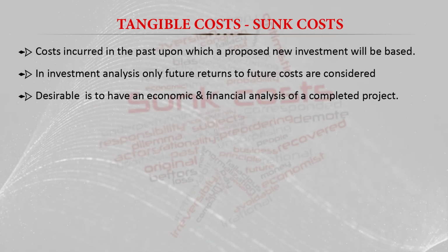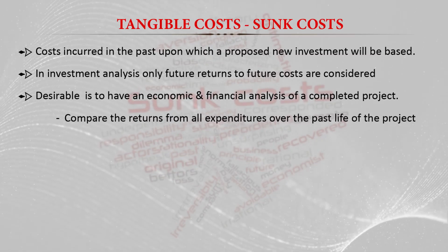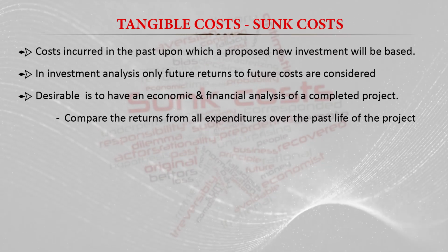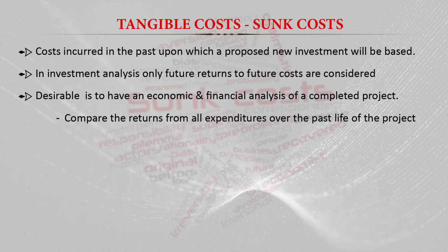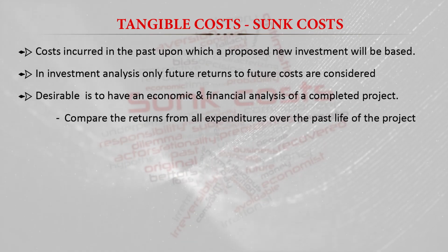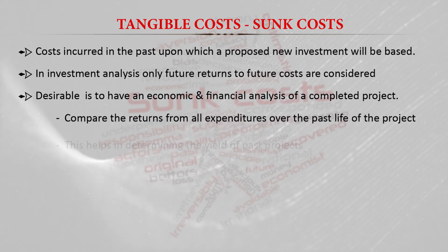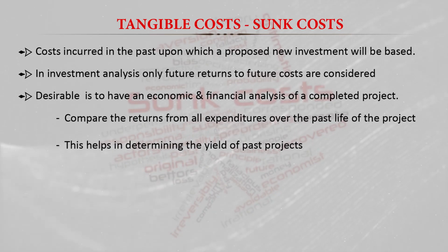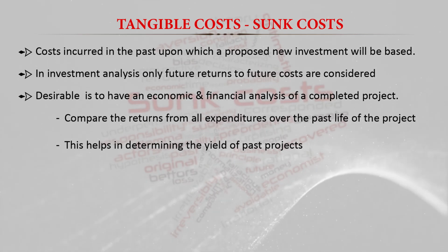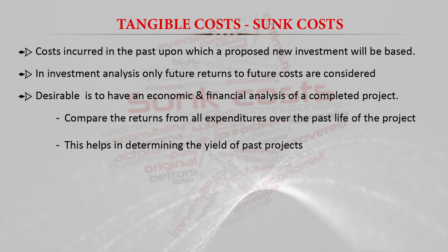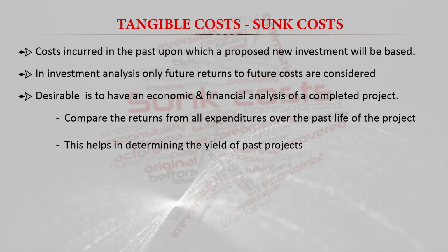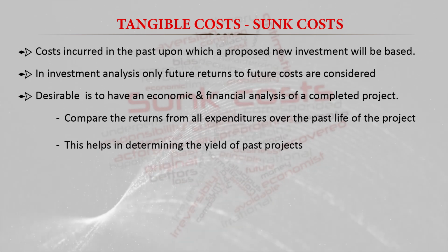We want to compare the return from all expenditure over the past life of the project, so we should include the cost of the land also. This helps in determining the yield of past projects. If we include the sunk cost as part of the cost and benefit analysis, it will help in determining the yield of the past project also.